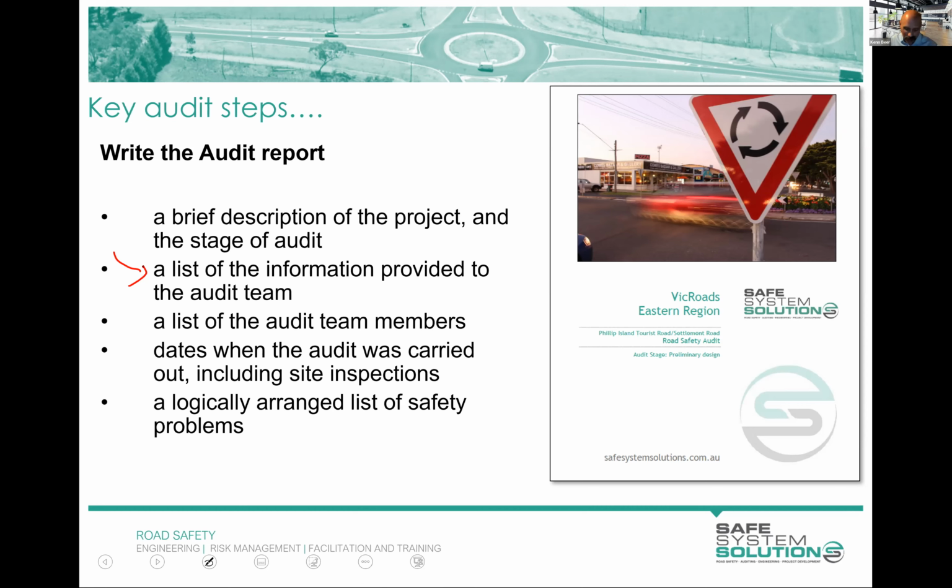I tell you this from experience of being in those positions, and luckily having very good documentation in the audit report to say, well, this is the version of the design that was audited. Here it is. That feature does not exist. Thus, we could not comment on its safety because it was not part of the plan. Somewhere down the track, they've injected this into the project. And they thank you for your time, and they carry on looking at why this was implemented and why other reviews weren't done and the like.